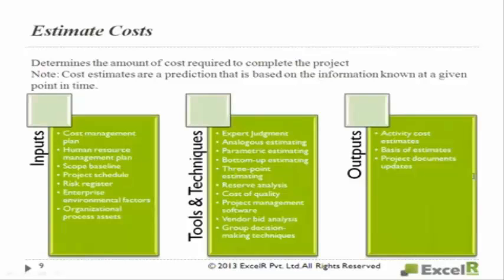The cost baseline, when you arrive at a cost baseline, you will give your rough order of magnitude, like plus or minus 5%. So even those factors you will add as a reserve. That is what the reserve analysis is all about. Now, if you think that the cost of a developer now is say $10 per hour, you will factor that it may go to $12 or it may come down to $8. So you may factor it like $12. That reserve you will add, and at the end of the project you may end up saving some money also, if this thing comes down.